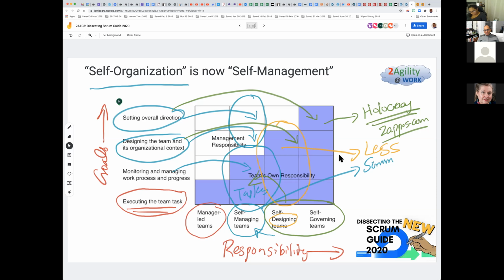Now, granted, you want to try to say something like "and other duties as assigned," which I always hate when it's in anything I have to sign up for. But that's the only way you can guarantee that you have someone who will pitch in. And the other thing is, a lot of times you need enough different skill sets that no one person can have them, and you really do have to have people matrixed. Maybe if you've got multiple teams working together, you have them matrixed to one team 20%, another team 30% in their specialty, because all the teams need a partial resource.